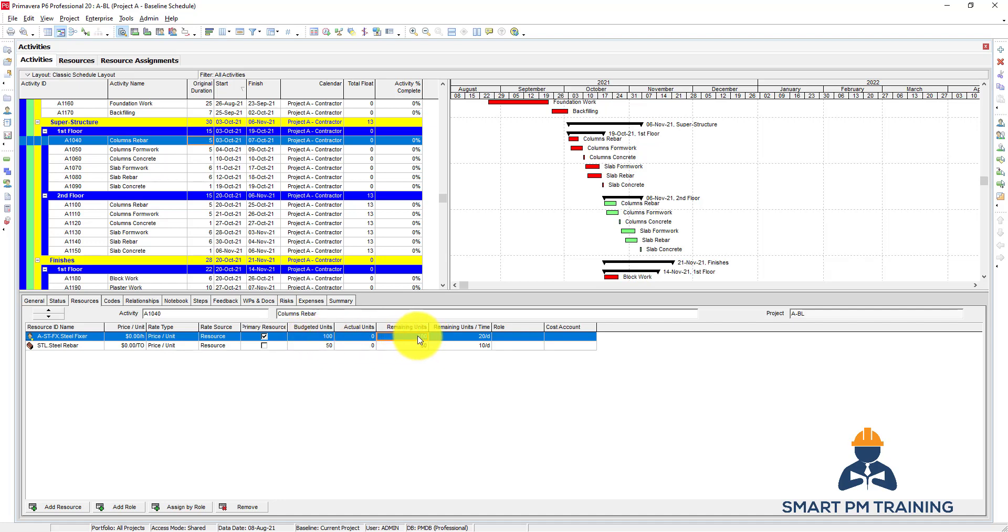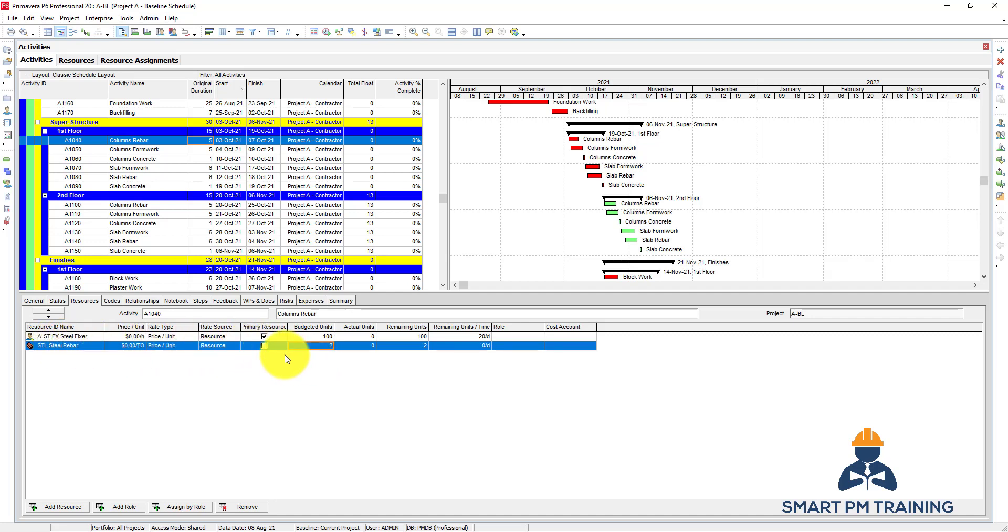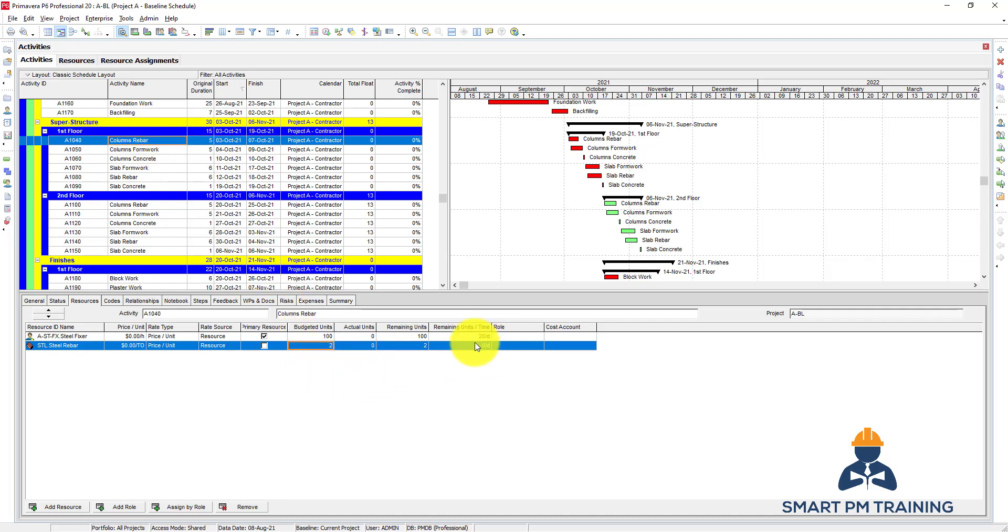For the steel rebar, everything is the same, but here the budget units for me is not hours, it's tons - the unit I identified before. For labor resources, the unit is hours. For the material, it depends on your material type. Steel rebar I identified as tons, so let's say we have 2 tons. Overall 10 tons. You don't have here to mention the quantities per day - it doesn't make sense. You have for this activity overall quantity to be accomplished, 2 tons. Primavera will calculate for you how much you need to accomplish per day.